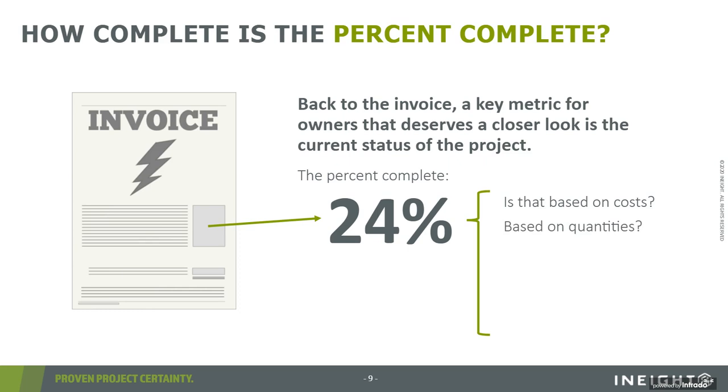Another variable that people often refer to, and probably one of the most asked for things of our contractors, is what's the schedule? Where are we at? What is our resource and cost loaded schedule look like, and what is our percent complete on those activities? So is it based on days? I would argue from experience that hopefully it's some sort of composite of all three of those, right? Because any one of those could be misleading.